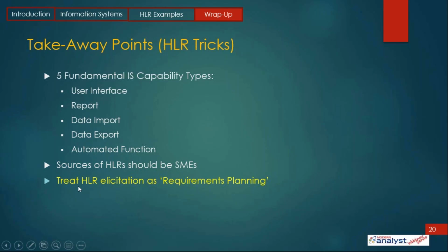And the last takeaway point is to sell your high-level requirement solicitation not as requirements gathering, but as planning. So we don't say we want your requirements. We want to do some planning. I need to talk to some subject matter experts. Those sessions should take hours, not days, if you keep it at high level.